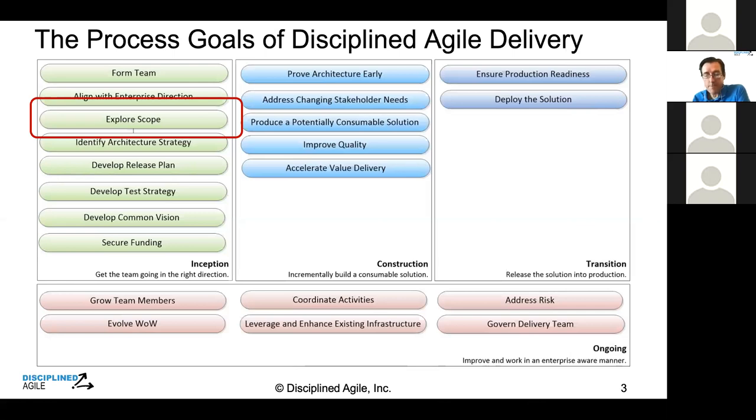Different ways. We often see different techniques, and by the way, we have that in our goal diagrams. We have different estimating strategies. You could use t-shirt sizes. If at the higher level, story points are probably a little bit too granular for what you want to do, so we often see small, medium, large, extra large t-shirt sizing.